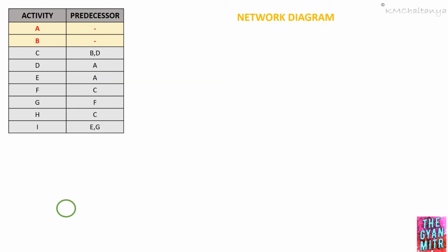And also, since there are two activities which are starting at first, we cannot have two initial events. So this is very important. Even though there are multiple number of activities which will be starting first, we need to always start with one single initial event. Therefore, from one single initial event, I have activity A and I have activity B. Now let's move on to the next activity.